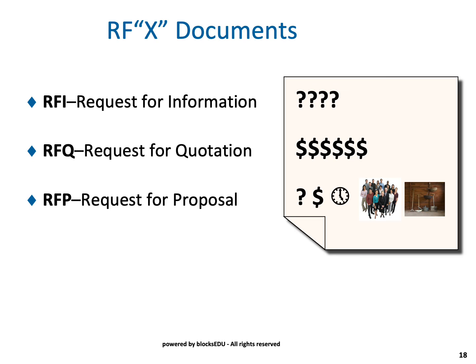Let me give you a good example. Let's take project management, for example. Let's say that within your organization, you don't have any project management office, you don't have any special project management people there, but you have this very important project. What you do is you would send off a request for information because you have no idea what the main components in project management are, and you would send it to project management companies that provide that service, so that you then would get some idea of what components, what things need to take place in order for a project to be run successfully. So that's an idea where you use an RFI.